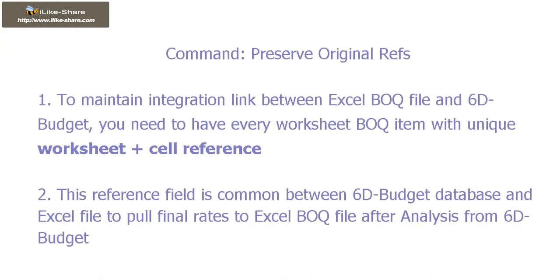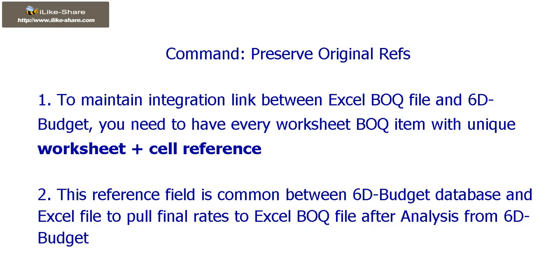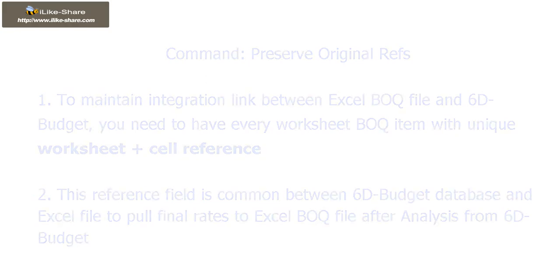To maintain integration link between Excel BOQ file and AEC budget, you need to have every worksheet BOQ item with unique worksheet plus cell reference. This reference field is common between AEC budget database and Excel file to pull final rates to Excel BOQ file after analysis from AEC budget.